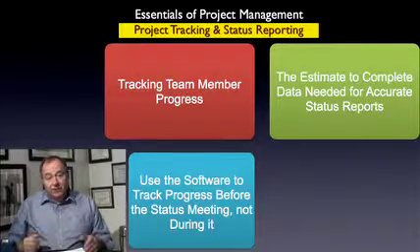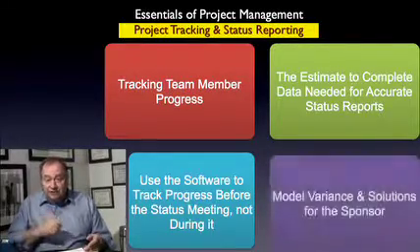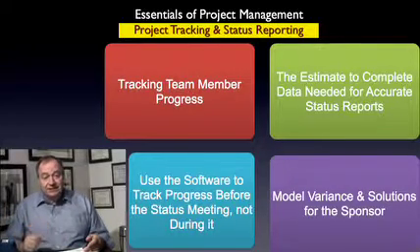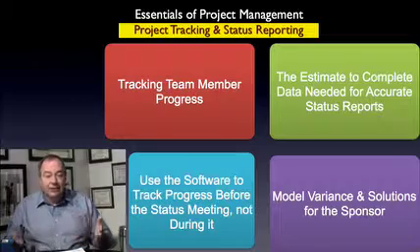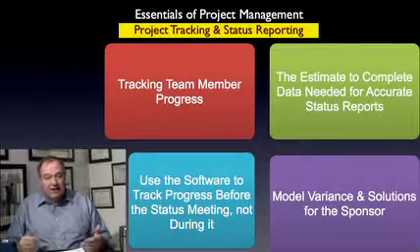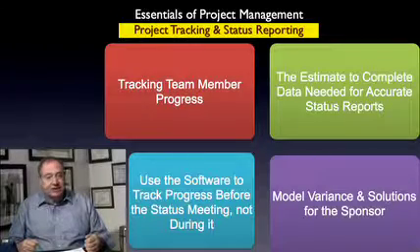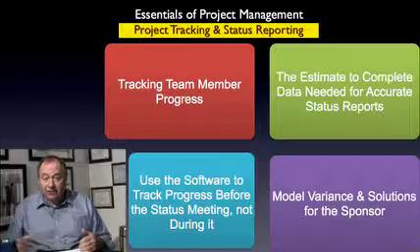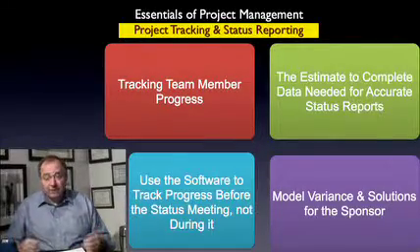The only thing you're going to check in the system is whether the combination of the hours worked and the estimated hours remaining exceeds the original estimate. You're probably going to meet with the person anyway to talk with them about what's going on. So having them write a status narrative is never going to be sufficient. And so why bother have them do it at all? You just talk with them.